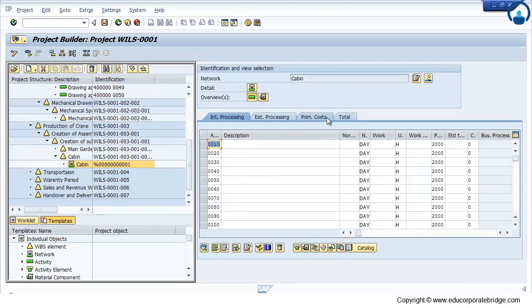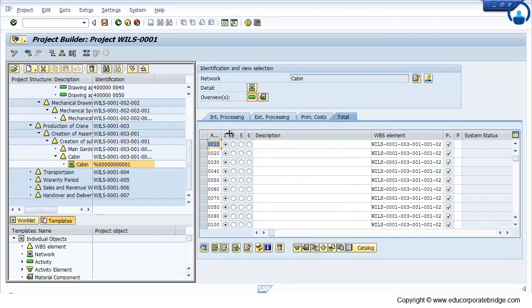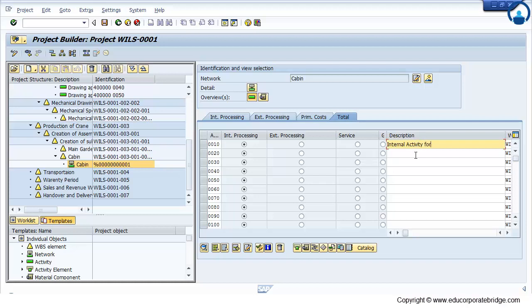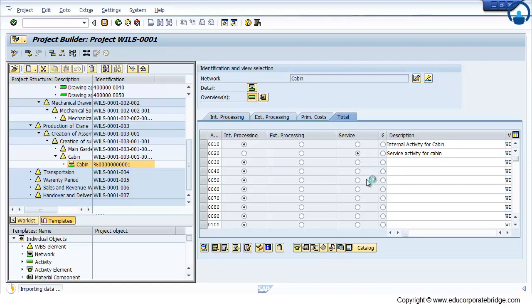Just click on the activity. Just go to total. Just give any name of that particular activity. And create one service activity. As soon as you click on the service activity and just click enter, system will ask you to maintain the services.